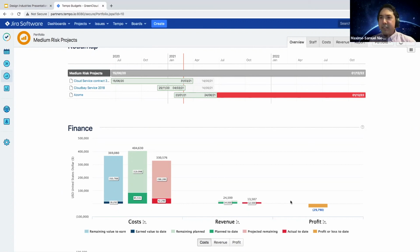Yeah, absolutely. Of course, it's going to depend on things like what's the scope of your project. Say if it's a 3-day project, then obviously you're going to look at it every day. Whereas if it's a 2-year project, at the start especially, you're going to look at it maybe once every 3 months, because nothing really has started, and then it's going to start within the later half of those 2 years or something like that. And what I also like about looking at reports frequently is the time taken to actually review the report reduces significantly, because it doesn't change that much and you kind of remember where it was. Whereas if you come in once a month, it's like, okay, where was it? What's changed? And things have kind of moved. You've got to spend all the time, as opposed to going, open the report. Okay, that looks good. On to the next. Versus open the report. That doesn't look so good. I'll spend a little bit of time and find some things that we can shift.